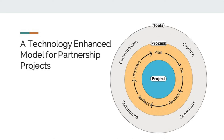The fourth stage is Reflect, where the team review and reflect on the current sprint process. It's really important to stress that they are reflecting on the process and not the product, and the aim of the reflection is to continually improve the process.